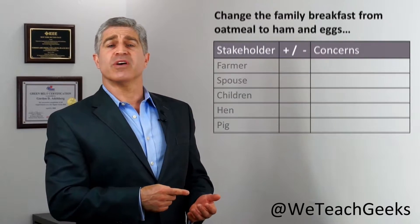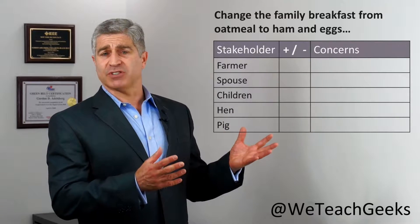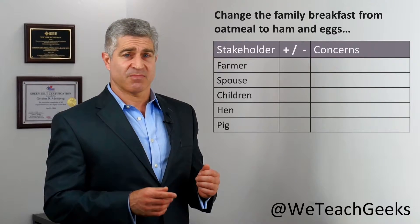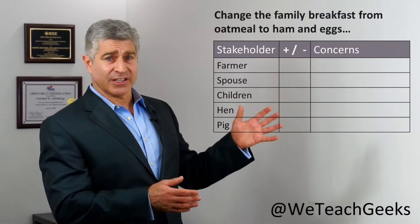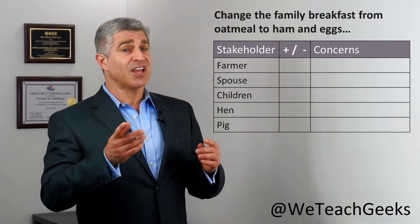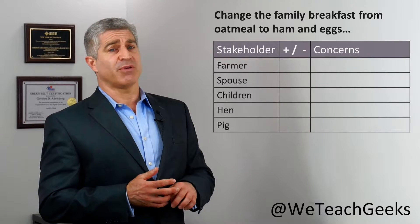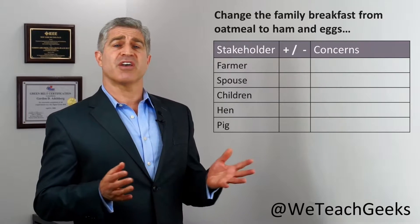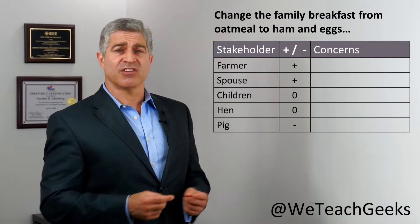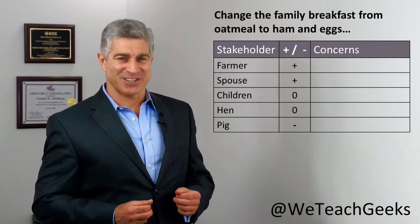Let's start with all the people involved. We have the farmer, the farmer's spouse, the kids, the hen, and the pig. So we've got our list. Next, are these stakeholder groups going to be for this change? Are they going to be neutral? Are they going to be against it? We can fill in this column — and look at the pig. He's going to be a big-time resister.